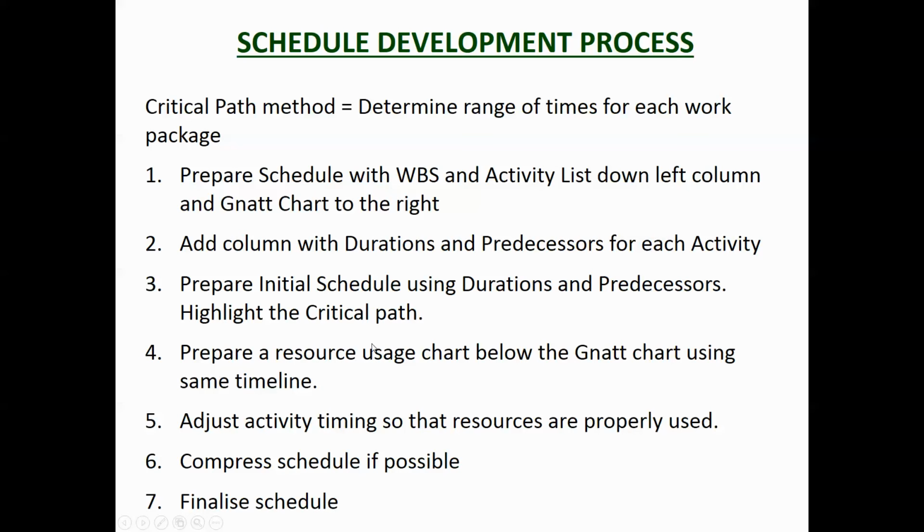You look at it and you try to reduce the amount of time it takes, and then you finalize it. So you may well end up with an initial schedule, but then you find that maybe you're not using the resources properly, or you've got resources over allocated, which means that you've got, say, an excavator doing 2 jobs at once, and obviously it can't. So you've got to deal with that, or it might be that you're not using it wisely. So you'll keep on mucking around with the schedule, the sequence, and the resources, and come up with something where you're using your resources properly and you bring the project in on time.